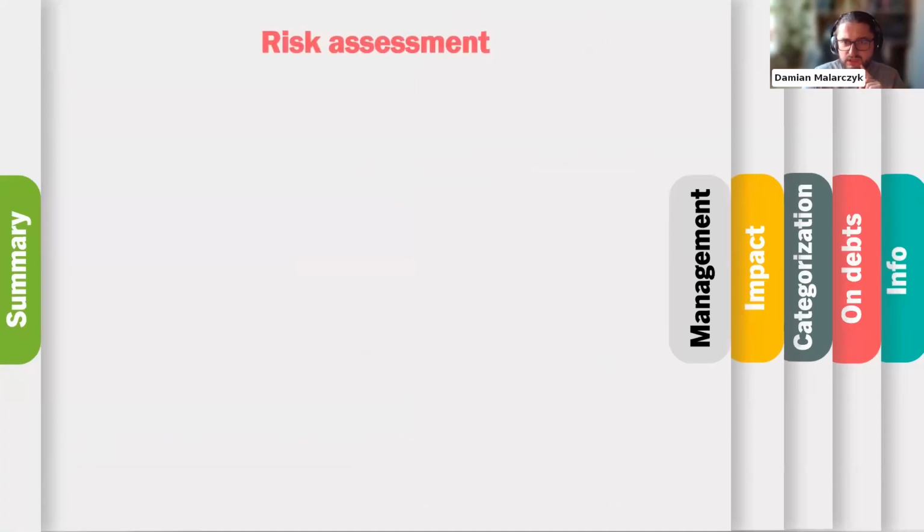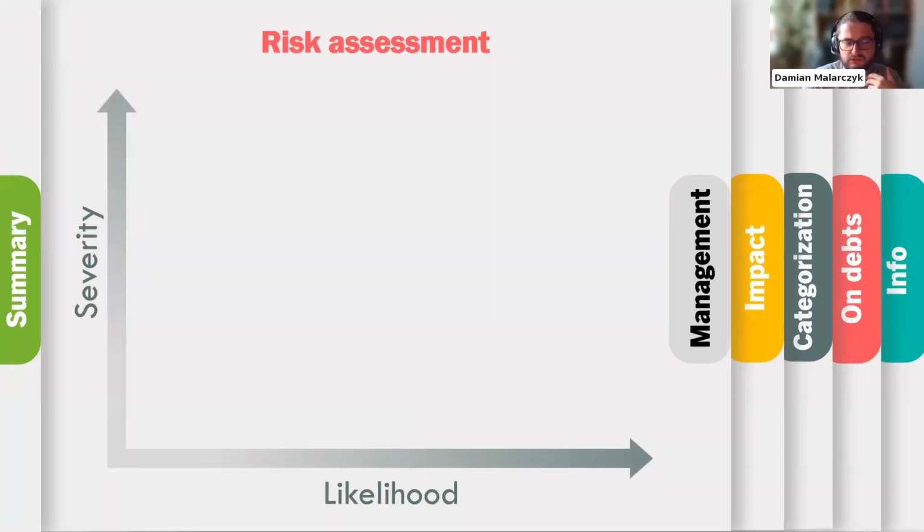So last notes I will make is about risk assessment. This is a big topic on its own. We are not going to cover it fully today, but just so you know, it has its own ISO standard. And for the simplicity's sake, we will focus only on what is most useful, at least from my perspective. So there is trying to assess likelihood and severity. And it can be descriptive, like we estimate the likelihood is low or extremely low to almost surely will happen within next week. And then try assigning numbers to it.